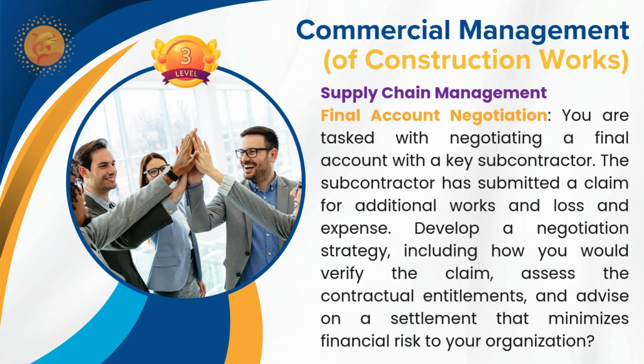If that is not successful, for providing the advance to him and getting the bank guarantee, then I will supply some services to him, so that I will take the responsibility for the materials and any equipment, and I will use his expertise and his technical supervision for the work in the project.